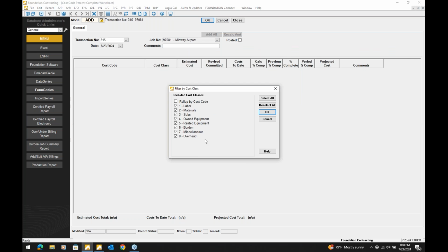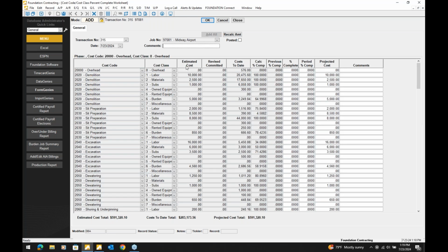Now, projections can be entered in various ways. It could be something that I want a single line item for, or if I want to project cost all the way down to the category, I could do so. That's going to be able to compare estimated cost. We even have the ability to enter in subcontracts. So take that second number, which is committed cost. We obviously can track cost to date through the accounting side. And then now we actually get a fourth number, which is projected.